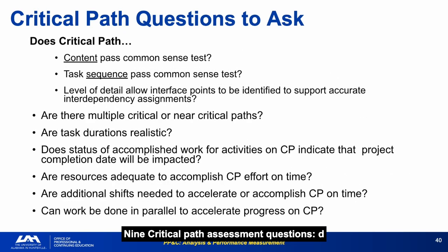Nine critical path assessment questions. Does content pass the common sense test? Does task sequence make sense? Is there enough detail to identify interface points? Are there multiple near-critical paths? Are durations realistic? The common sense test is underrated as an assessment tool.